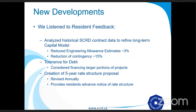There are some new developments. As we looked to revise our capital funding model, we listened to resident feedback. We heard we were too conservative, and so we looked at historical SCRD contract data to help us refine our long-term model. We reduced our engineering allowances by 3% and reduced the contingency we thought was necessary by 15%. We also heard there was a higher tolerance for debt, so where possible we considered financing larger portions of projects. We also heard that the uncertainty about future financial rates was causing some anxiety, and so we're looking to propose a five-year rate structure which will allow residents to be aware of their rates for a five-year period. This would be revised annually, ideally.